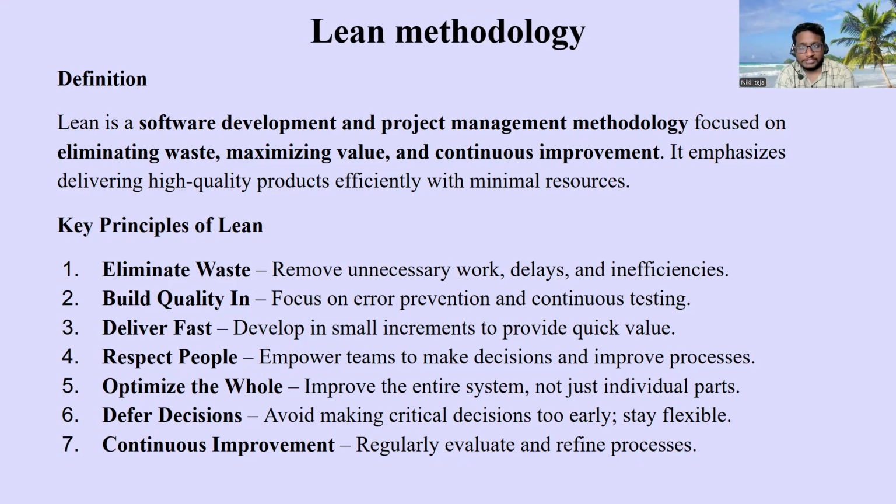In these 4 sprints, one PI is equal to 4 sprints. There will be three regular sprints and one hardening sprint. I will be explaining hardening sprint too. Hardening sprint is where only the development team will be working.